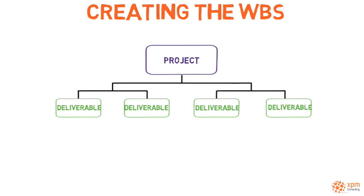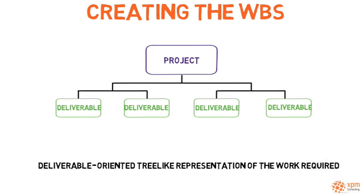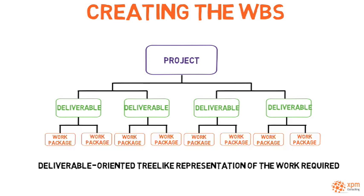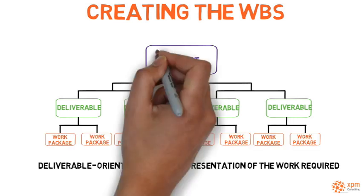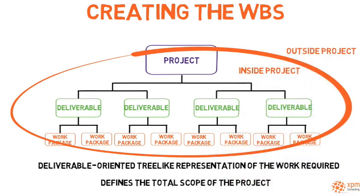The team can produce the work breakdown structure once the scope is defined. A WBS is a deliverable-oriented, tree-like representation of all the work required to achieve the project objectives. Technical and project management deliverables identified in the scope statement will be progressively decomposed into smaller and more manageable work packages. A WBS defines the total scope of the project — work that is not in the WBS is outside the scope of the project.